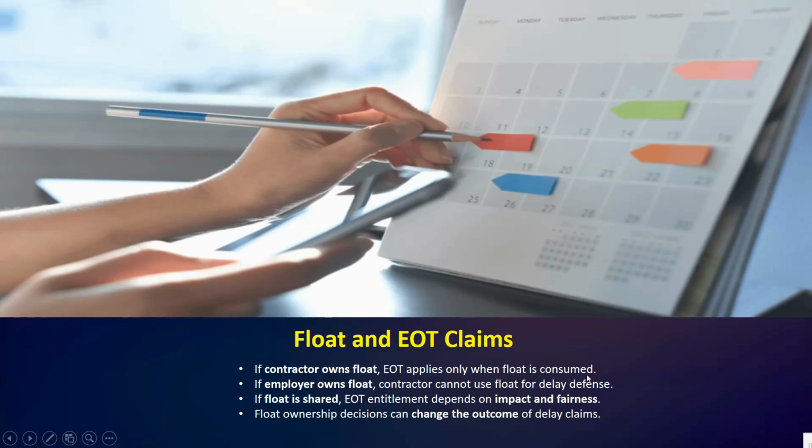The contractor can absorb minor delays until float is consumed, and EOT applies afterward. Second, if the employer owns the float, the contractor cannot claim EOT until employer-related delays exceed the available float.